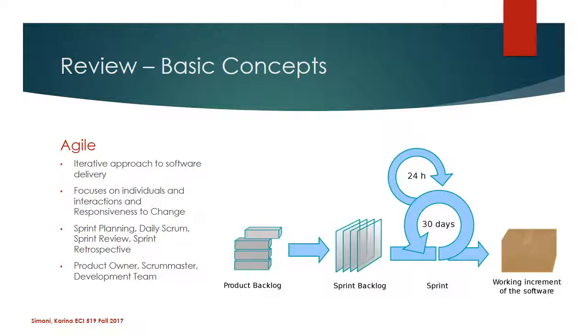We're going to take some time to reflect in a sprint review to see what feedback from our customer, from our students, from the weather, or the way the plants are growing, and we're going to reprioritize our user stories. We'll also have a sprint retrospective where we talk to our team, talk to our students, talk to our plants if we have to, and see what's going well, what didn't go well, and how can we improve.